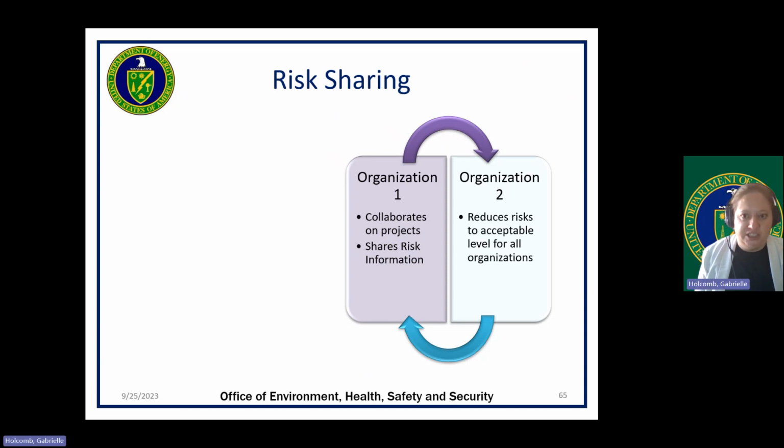Good risk sharing approaches normally will combine agreements for cost sharing on preventative and deterrent measures. The policies allow for inclusion of costs and budgets and the contribution agreements themselves, and agreements on how to deal with residual accepted risks should they materialize. Also included are agreements on organizations' responses to identifying, reporting, and potentially disposing of counterfeit, fraudulent, and suspect items.